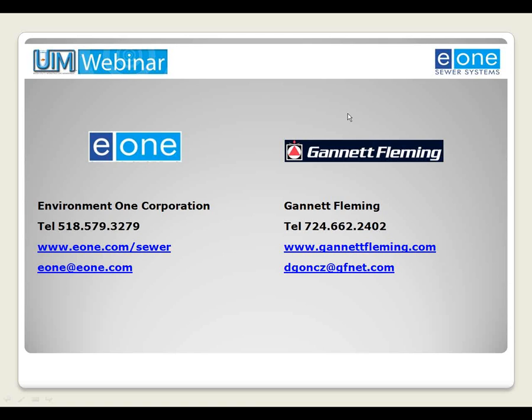The lessons learned moving forward on the projects that Gannett Fleming does now for their clients, we encourage the owners to also install that 150 feet, if you will, and install the grinder pump and build that cost into the overall project cost and the user fee structure for the primary reason to have some type of control over the quality of the installation. After all, the owner is going to operate it when it's complete.